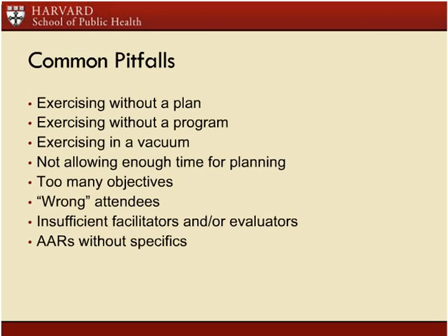I think you can put in as many caveats as you'd like at the beginning, that this was an exercise where you were trying to find fault, you were really trying to work hard, and you were very successful in finding fault, and try and spin it that way. But after-action reports really should be specific, because otherwise your improvement plan can't be specific and you're not going to make measurable change.